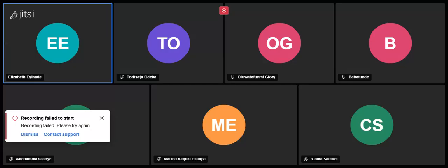Depending on your organization, you can say, oh, you want to run a sprint of 2 weeks, for instance. The standard sprint is usually 2 weeks. So you want to run a 2 week sprint. So in that sprint, from your product backlog that you have prioritized, you now pick items. You pick a lot of items for this particular sprint, because this sprint is 2 weeks now.